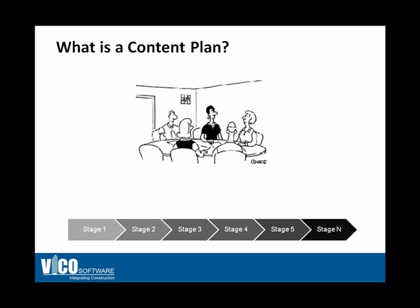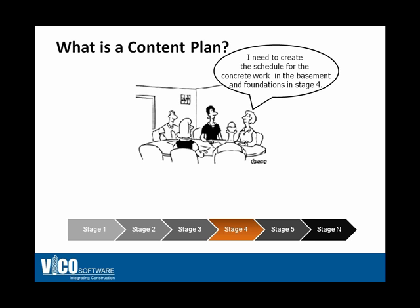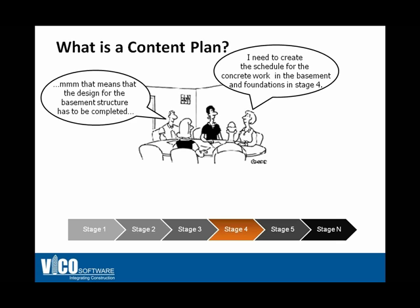So what exactly is a content plan? The good news is it is something that you already do today — the content plan simply formalizes that. It is a document that captures the requirements of information that needs to be available at a certain point in time during the project. For example, the team is discussing the requirements for stage 4. The scheduler identified the need to create the schedule for the concrete work in the basement at this stage, and the architect or structural engineer realizes that the design for the basement structure needs to be completed at that point — otherwise the schedule cannot be created.